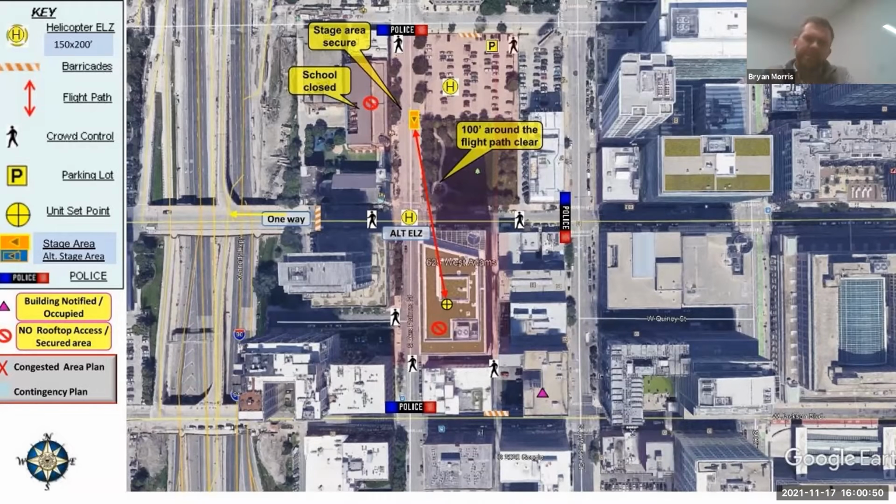So, what kind of time are we talking about if you'd gone the crane route? If you go the crane route, excluding permitting, let's say it'd take you a day to lift the crane up there, set it up, half a day to lift it, another day to deconstruct the crane and then reconstruct it on that next level, and then another, call it half a day to lift, gantry over, and then set in place, which you would most likely need some type of alternative lift up there to be able to lift this exhaust fan, because the exhaust fan was essentially double the size of the one we were replacing. So overall, it would have taken us about a week to do it.